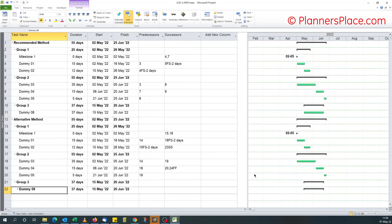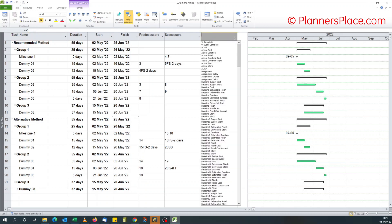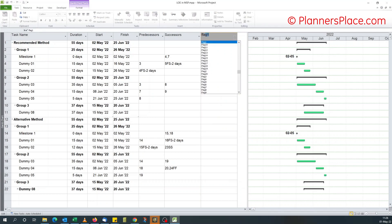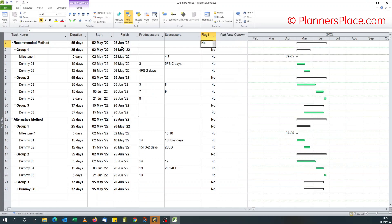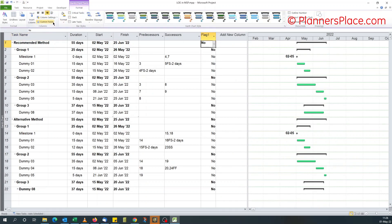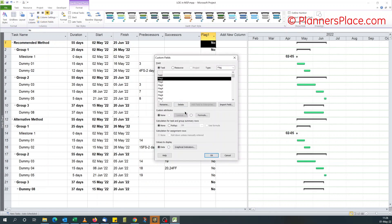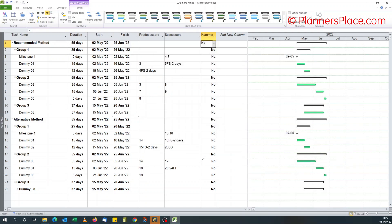To solve the summary task appearance, we add a flag. We can either use the marked flag or just use a new flag. I like using a new flag — so take flag one, go to task format, custom field, rename flag one to 'mark', and say yes.